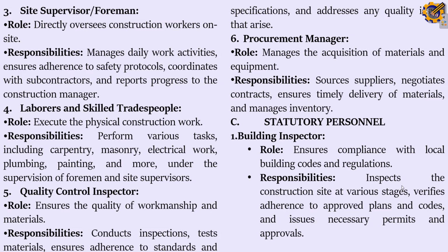before approving them. So they inspect the construction site at various stages. That's why, if construction is going on in some area, you might notice some people come, and if they see that you didn't comply or didn't collect approval, they will seal that place off with their red tape and tell you to stop work. So that is to ensure compliance.